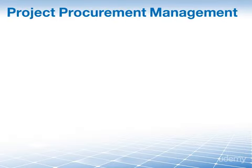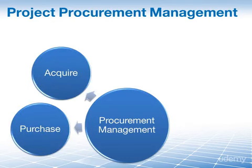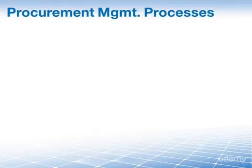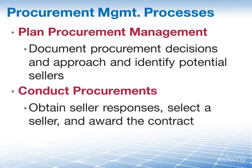Let's do the overview. Project procurement management includes the processes that are necessary to purchase or acquire products, services, or results that are needed from outside of the project team. Procurement is all about buying things from the outside. The first process is plan procurement management — documenting project procurement decisions, specifying the approach, and identifying potential sellers. Our second process is conduct procurements: obtaining seller responses, selecting a seller, and awarding a contract.